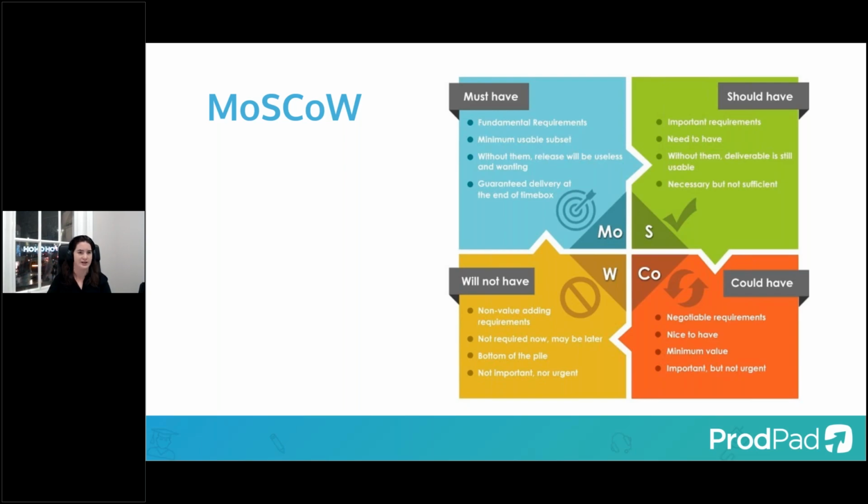More and more, I'm finding that this one isn't really fit for purpose. It seems to be more of an outdated, project-focused one. MoSCoW came out of a waterfall style of prioritizing, and it's set with the idea that you've got a fixed scope and you're working out which features need to go into a set project for that one particular client that you're building for. And so it doesn't really give clarity on what to do when faced with a long-term product strategy.